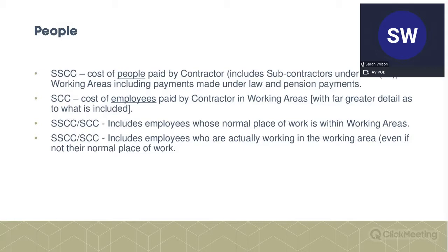If you move away from your pay slip, there might be a company car, which is obviously a substantial cost to the business. There may be other costs, or health insurance. So, there's all sorts of costs. So it's not just a person's gross salary. It's all sorts of other things that need to be taken into account. So that's why it says payments made under the law and pension payments.